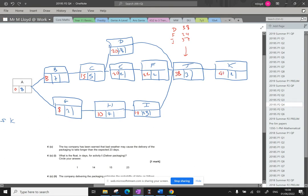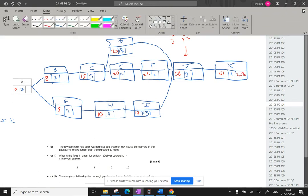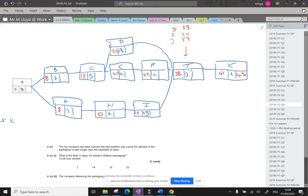That means there's going to be a little bit of slack with some of the others. Okay, 41 plus 2 is 43. So this whole project, if it all runs to time and all of those critical routes go well, it's going to take 43 days to do. Okay, let's now work it backwards.